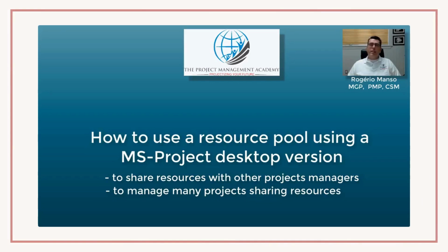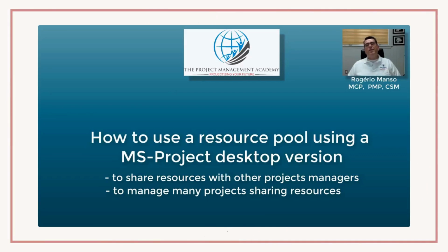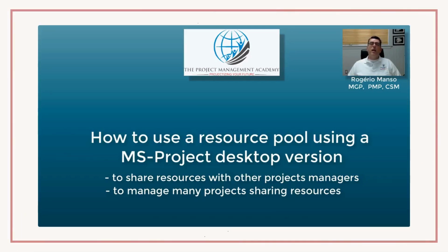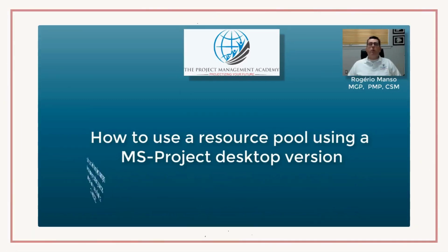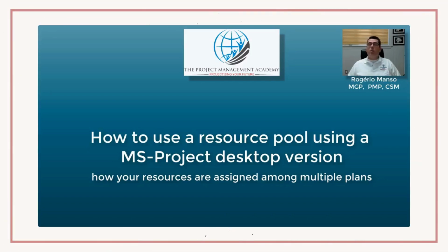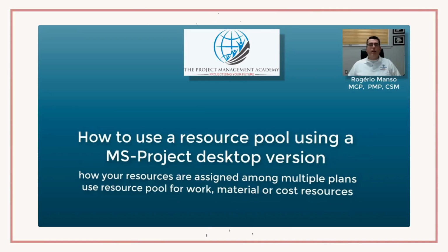The best way to do this is working with MS Project Server. But if you have only the desktop version, I'll show you how to use a resource pool and how to share your resources with other project managers, making sure that your resources will not be over-allocated. A resource pool will help you see your resources and how your resources are assigned across multiple plans. You can use a resource pool for work resources and for material and cost resources as well.